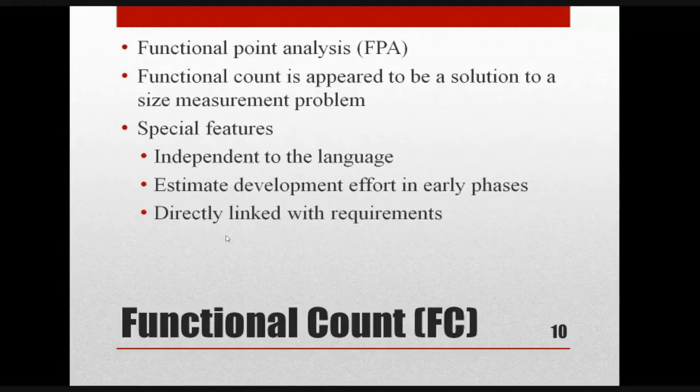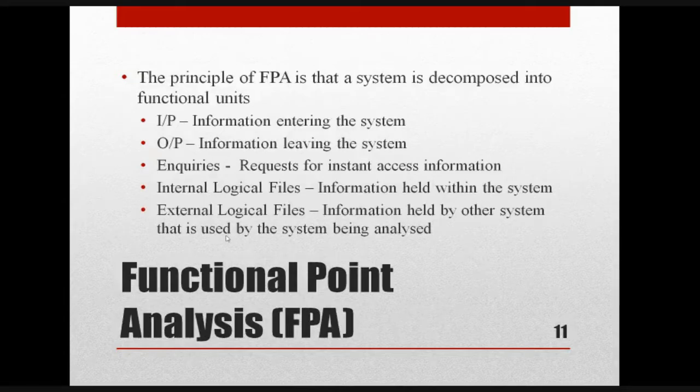What we can do is, based on the requirements, we can identify the functional counts. So it is directly linked with the requirements. So these three special features are there for function count, right? Okay. So what is the principle of functional point analysis or functional count? The principle of FPA, functional point analysis, is that the system is decomposed into functional units, right?